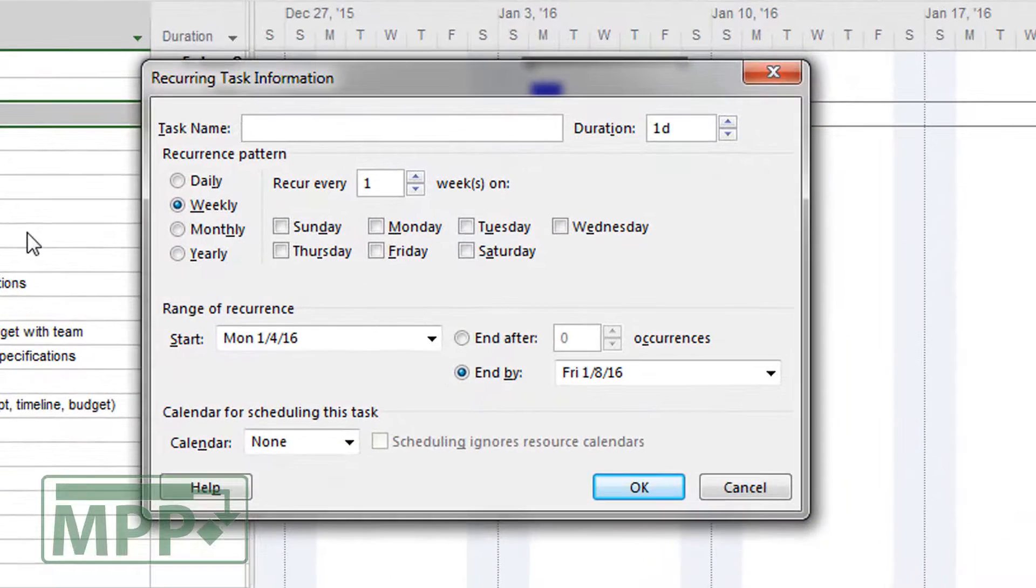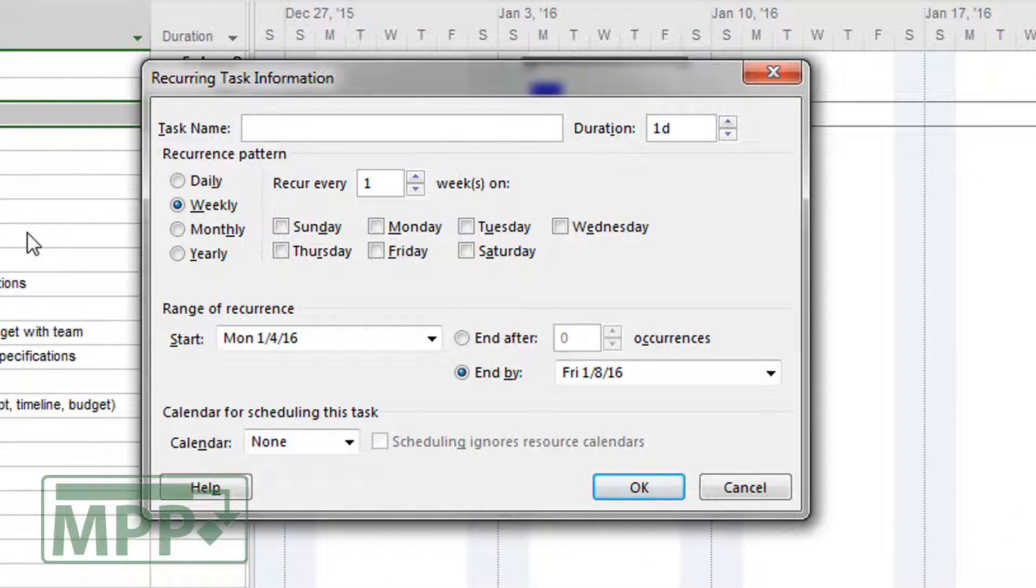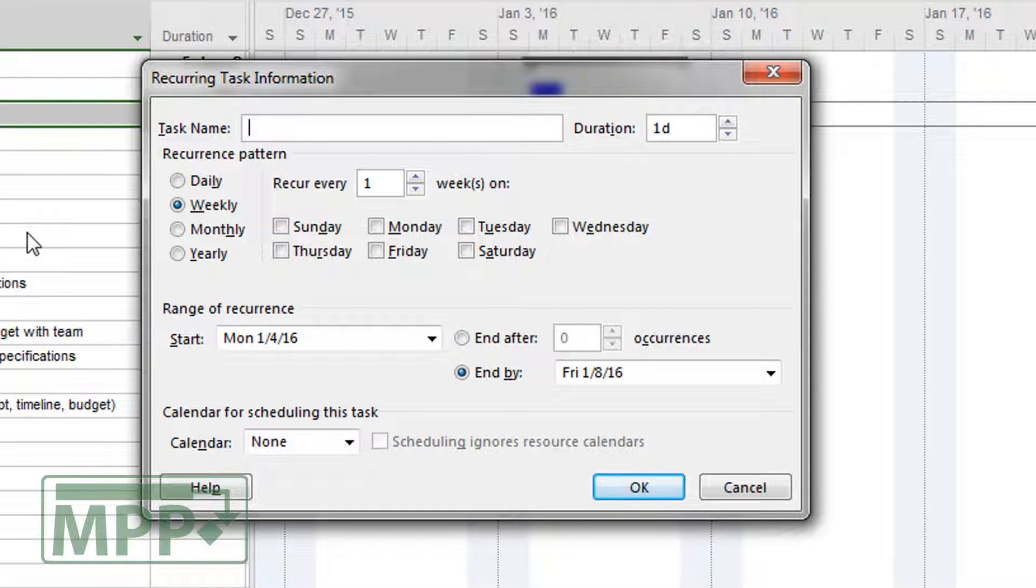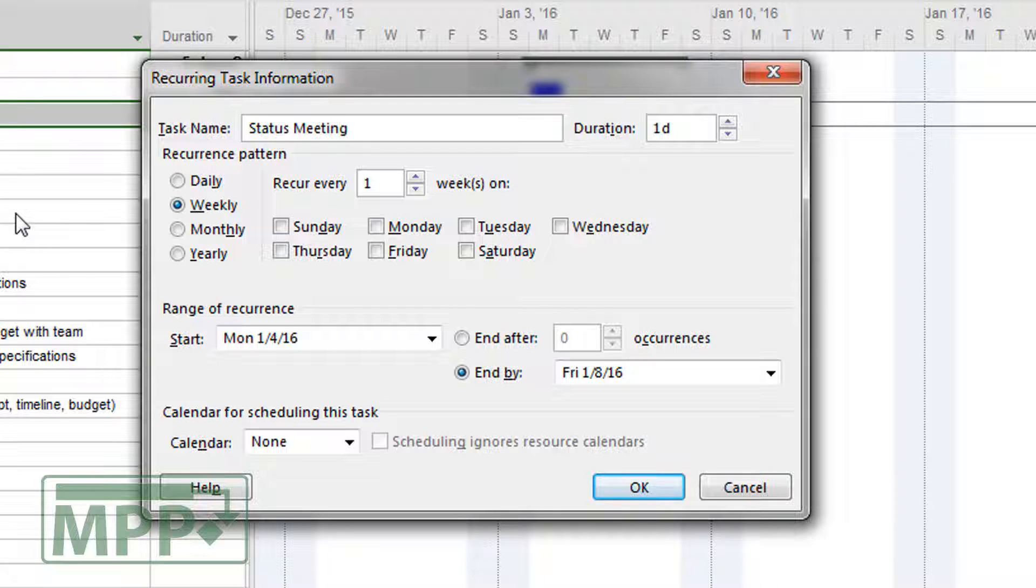You're going to get a dialog box that is looking for you to put specific information about the recurring task. This can be very useful when you're setting up things like status meetings and other types of recurring events within your project. So I'm going to type in status meeting here and hit the tab key to get me over to the next item, which is duration.